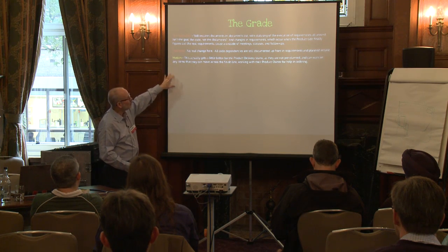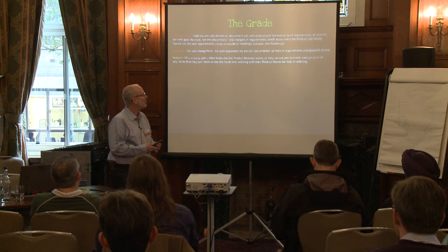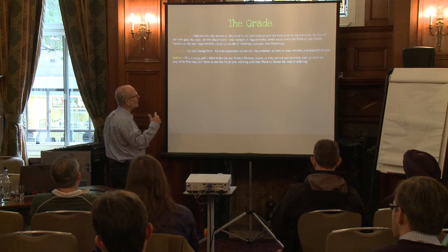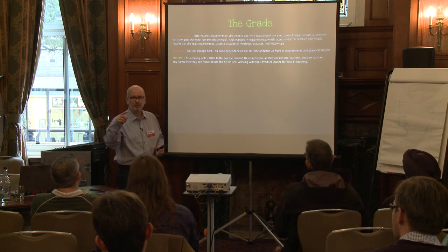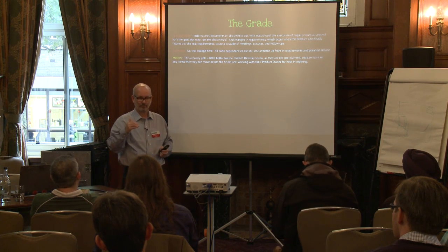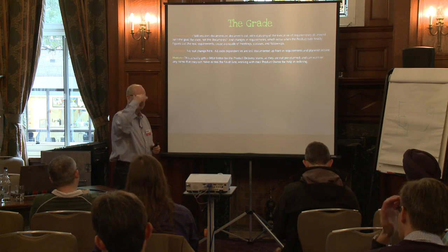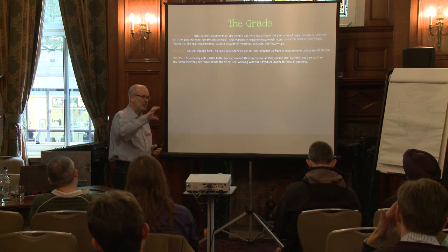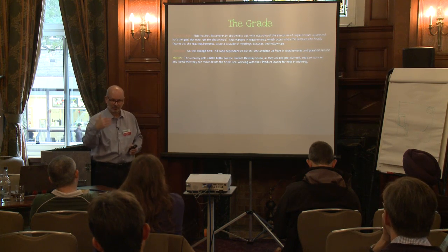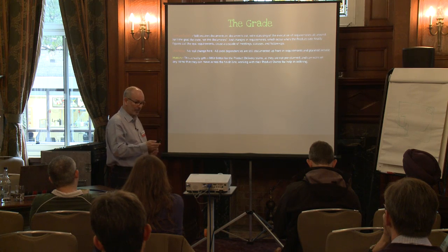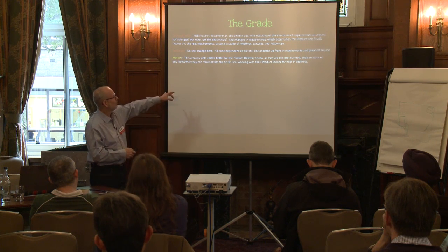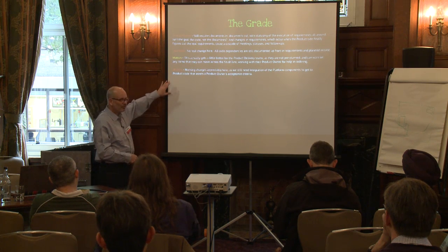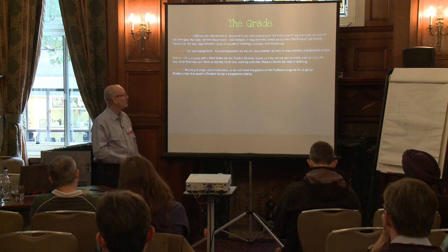Motion waste actually gets a little bit better, right? And it's better because the planning that goes on inside of the product teams is no longer predictive, right? The product owner is making more decisions just in time at the last responsible moment when they have the best information and can make the best decisions, right? A very lean kind of phrase, which I'll give to Mary Poppendieck, right? So motion waste gets better. Waiting doesn't get better, right? We're still waiting on our platform teams to complete.